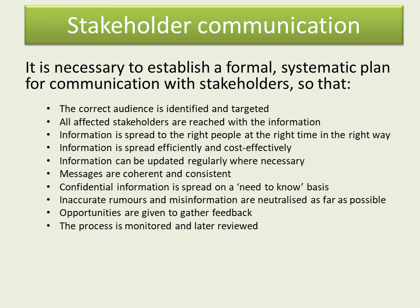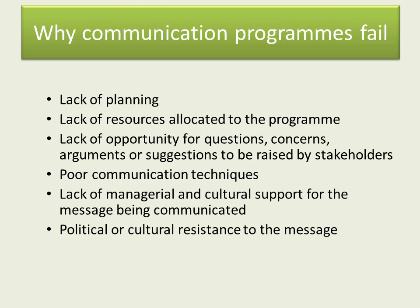Stakeholder communication is very, very important. We need to establish a formal plan so that the correct audience is identified, the right stakeholders are reached, information is spread to the right people, messages are coherent, and confidential information is shared on a need-to-know basis. So why do communication programs fail? Many reasons: poor planning, lack of resources, wrong techniques, lack of support, and resistance.